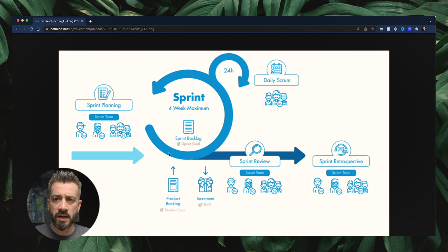The sprint is the cycle, as we said, in which we try to split some aspects of our project. So we have something called sprint goal, which is what we want to achieve in that time box period. That can be, as I said, from 1 to 4 weeks. Let's say it's 2 weeks. And in these 2 weeks, we have a number of activities, right?